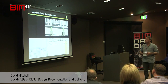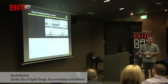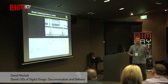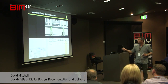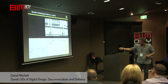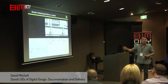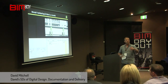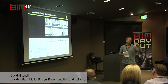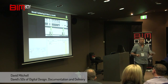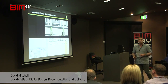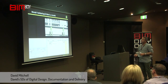The bane of our life is re-measurement. One approach is to say the model's wrecked, I can't rely on it, I'll measure it by hand — but the problem is next time it comes in I'll have to measure it by hand again. So instead we rely on the model for the quantity, which sits in our estimate sheet, and then we make an adjustment for any additional concrete needed to fill that gap. We give that workaround a number, search our database to find our workarounds, and send a note to the engineer asking what's going on. In this instance the offset was wrong, so once it's repaired in the model we delete the workaround and it updates again next time.